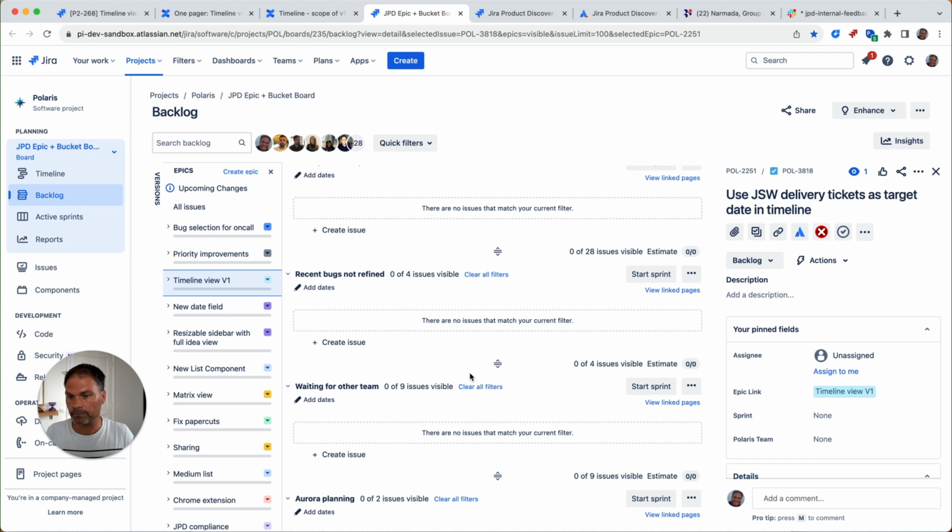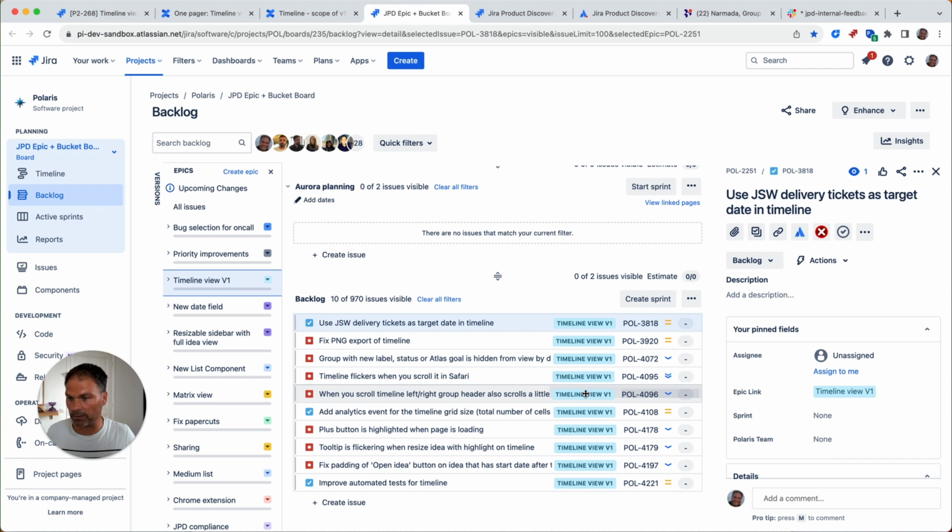So we do use Jira software as well. What happens is at the end of this meeting, the engineering team gets together and starts to create tickets for all the things that we discussed in the meetings, adds them to the backlog, and then pulls those into sprints. We review them as well as part of this meeting, but this is not what we center the conversation on. Instead, it's really in terms of product increments on a weekly basis.